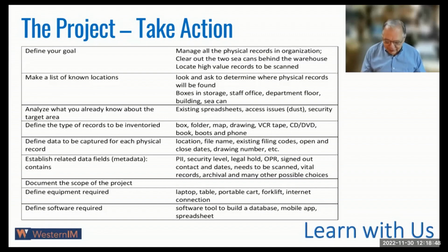Yeah, for sure, Rick. I've got a couple things I could add to that. I think the things you listed out look like a long list, but truly you need to think about hours, not days, to get this process underway. As a project manager, I have a three-phase approach to these kinds of things. Draft one is the concept, draft two is the details, and draft three is my plan. You really need to just quickly write it down and then go back and read it and ask, where do I need to change it?